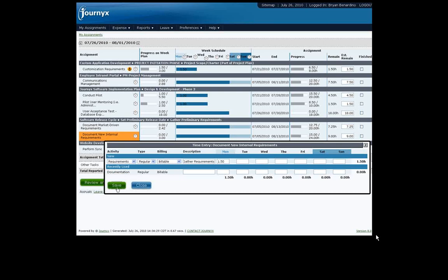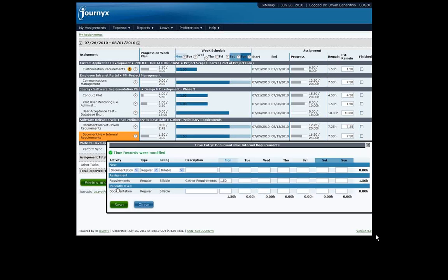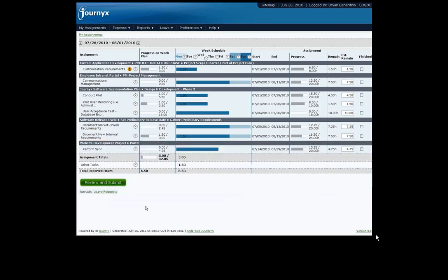Many people feel that it's enough to track project progress on a % complete basis, but this is just not effective as it doesn't tell an accurate or complete story. It's not consistent as well with established methodologies, which suggest that the only accurate measure of progress is tracking work effort. For example, time. Remember, I can see that I'm 65% done with my trip to my appointment, but that doesn't help me avoid traffic.